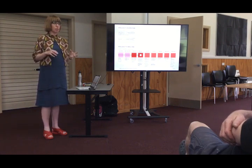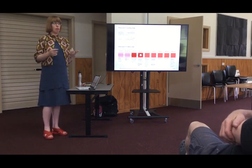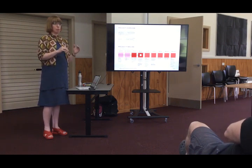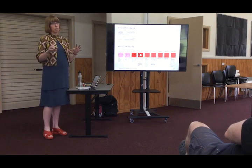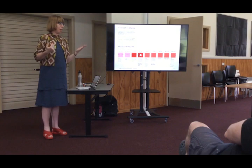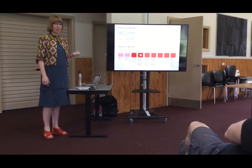So at the end of this process, what we want to have is some really good detailed plans. We've got a QS, a quantity surveyor, on board with the project, so they'll be able to associate funding to them, so then council and community will be able to put them into the capital works program over the next 5 years or so, or however long it needs to be, depending on what scope we design into the project. Does that make sense, people?